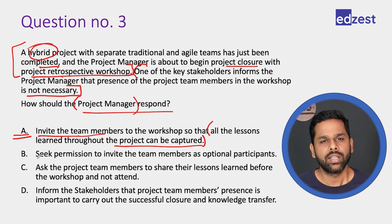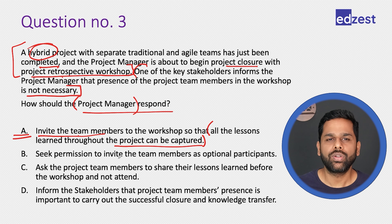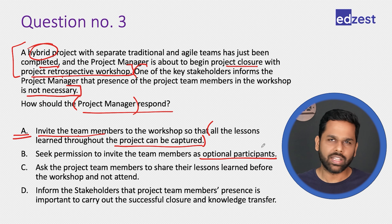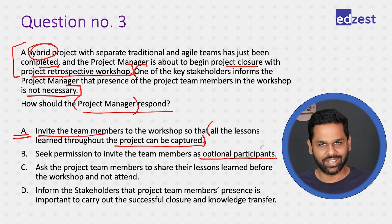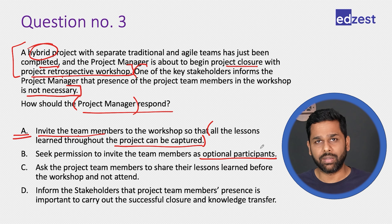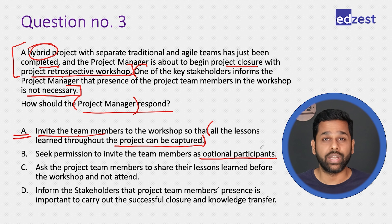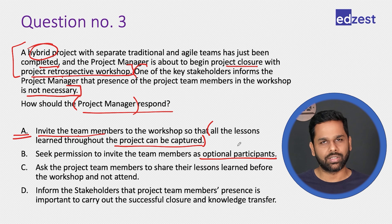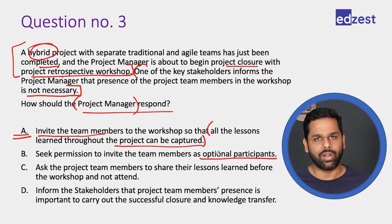Option B: seek permission to invite the team members as optional participants. This is not helpful. Either they should be present or they should not. If somebody is informing us not to call them, we will tell them we need them or we don't — we cannot say it is optional. Not a good choice at all.